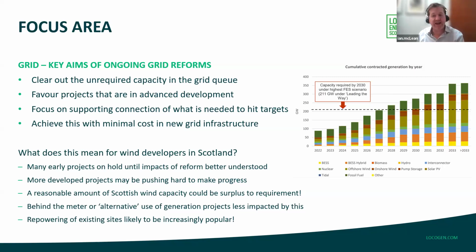So if you're the right technology in the right location and you have developed your project at a reasonable pace and secured planning and secured the property, then you will generally be rewarded with potentially a grid connection date that is sooner than you had originally expected.